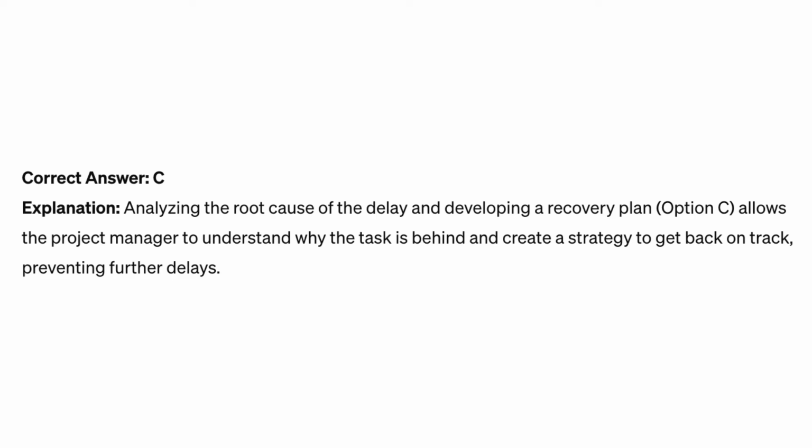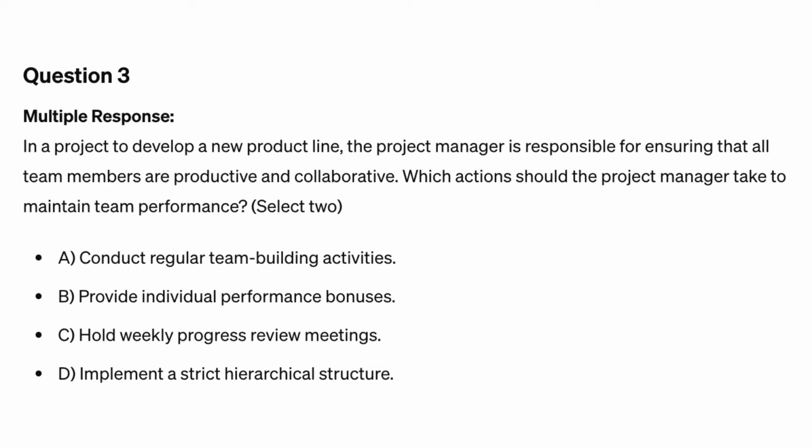Correct answer C. Explanation. Analyzing the root cause of the delay and developing a recovery plan, option C, allows the project manager to understand why the task is behind and create a strategy to get back on track, preventing further delays.